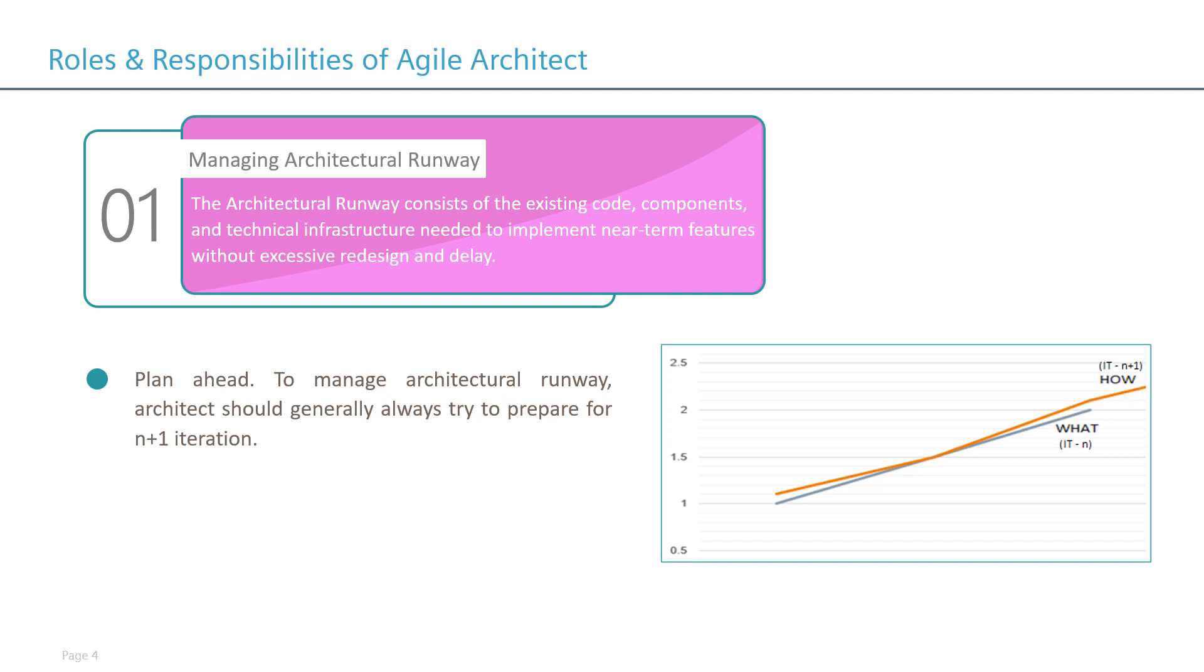The term architectural runway—from where it has come—so just to tell you, this basically started as an analogy while observing the iteration burn-down charts themselves. Often, when there isn't enough architectural runway, when a team starts an iteration, features committed in the iteration are at high risk. So basically, an iteration is like an airplane that needs enough runway to safely land. Now, architects are responsible for creating this runway.